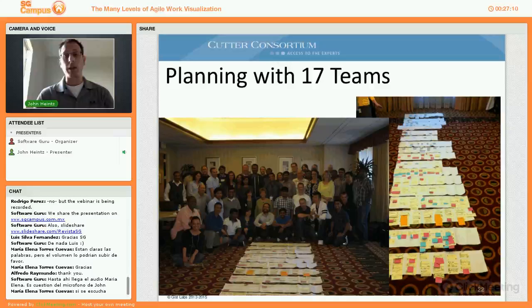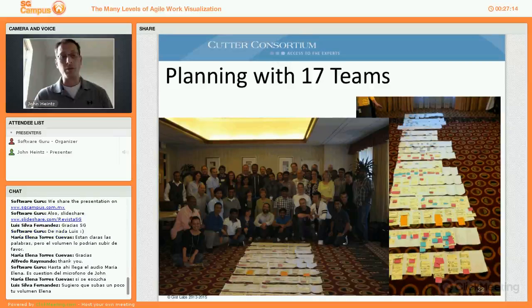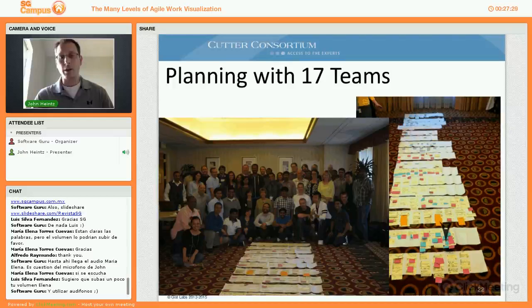And what we did is we planned out a number of months. This was a quarterly planning session, so it was 3 months. We can see, if I draw small pictures in here, each column represents a sprint that was planned in this case. Actually, that black is very difficult to see. Sorry, let me pick a different color. Okay. So each of these columns was a 2-week sprint, and the teams were doing sprint planning for themselves in the quarter, and also a little bit beyond the quarter.